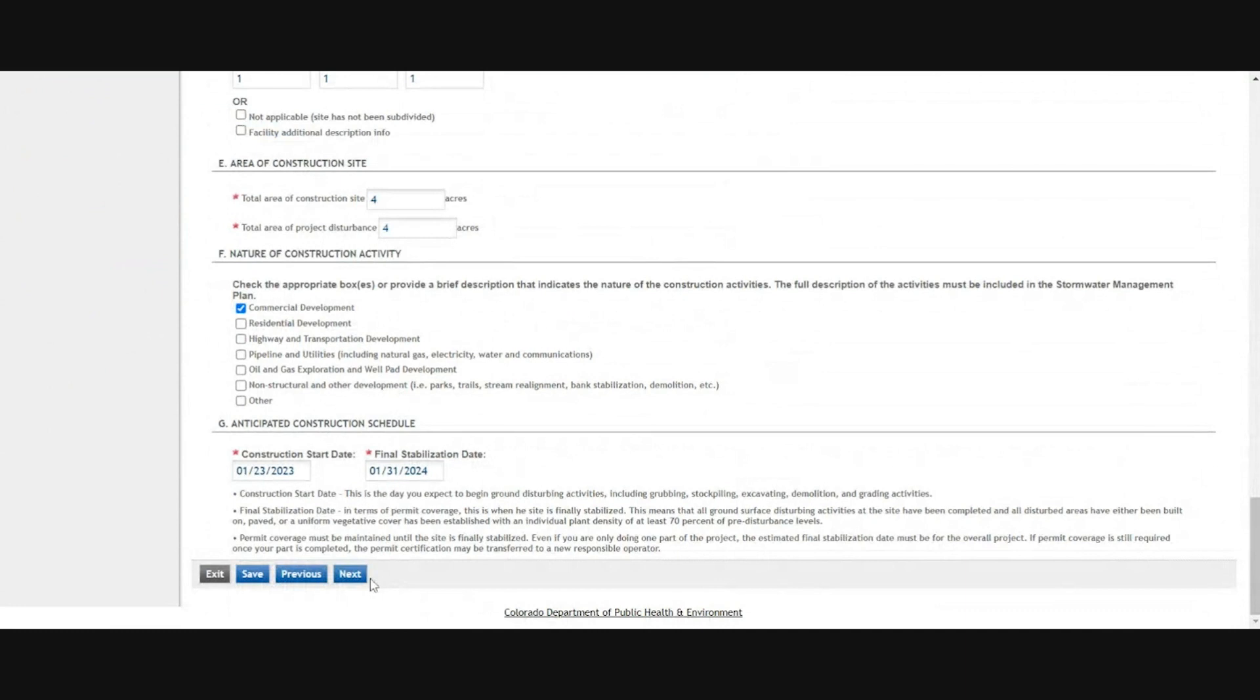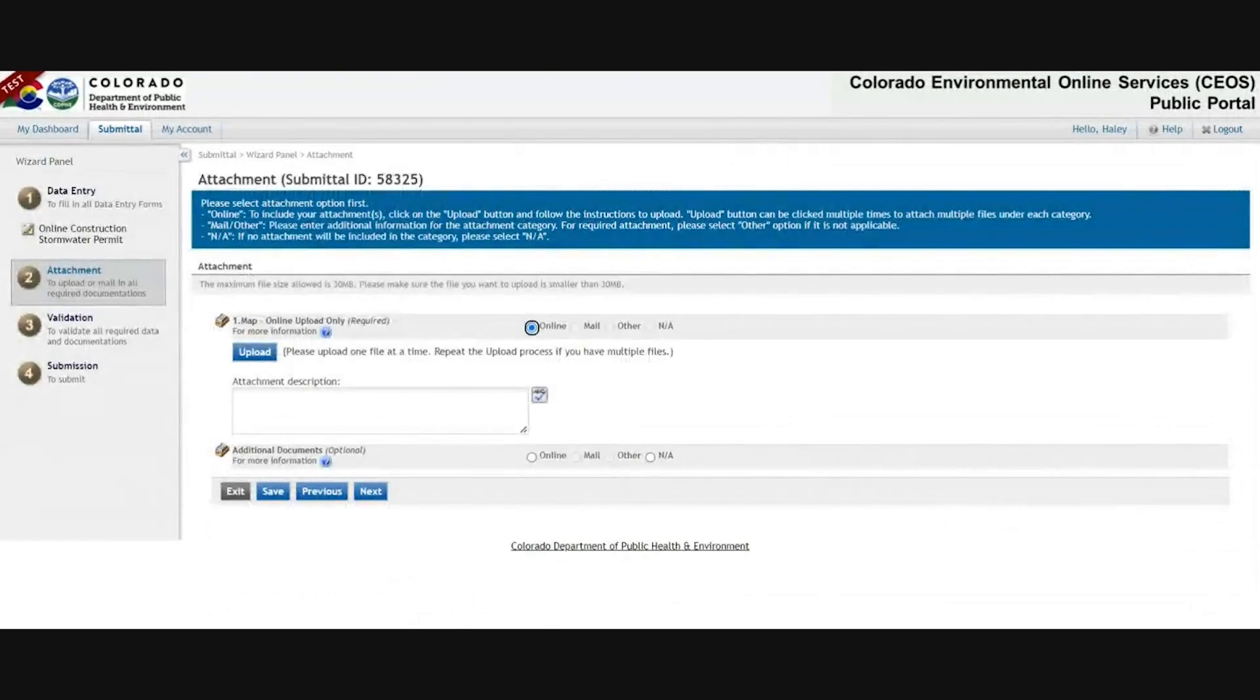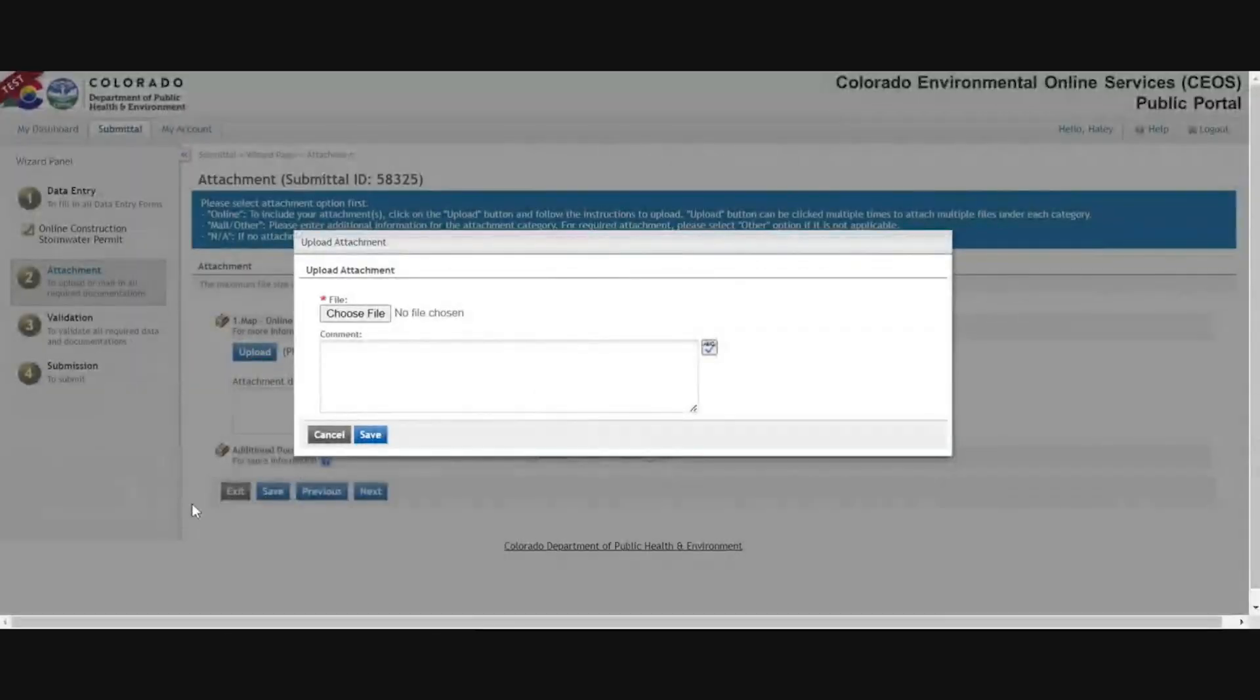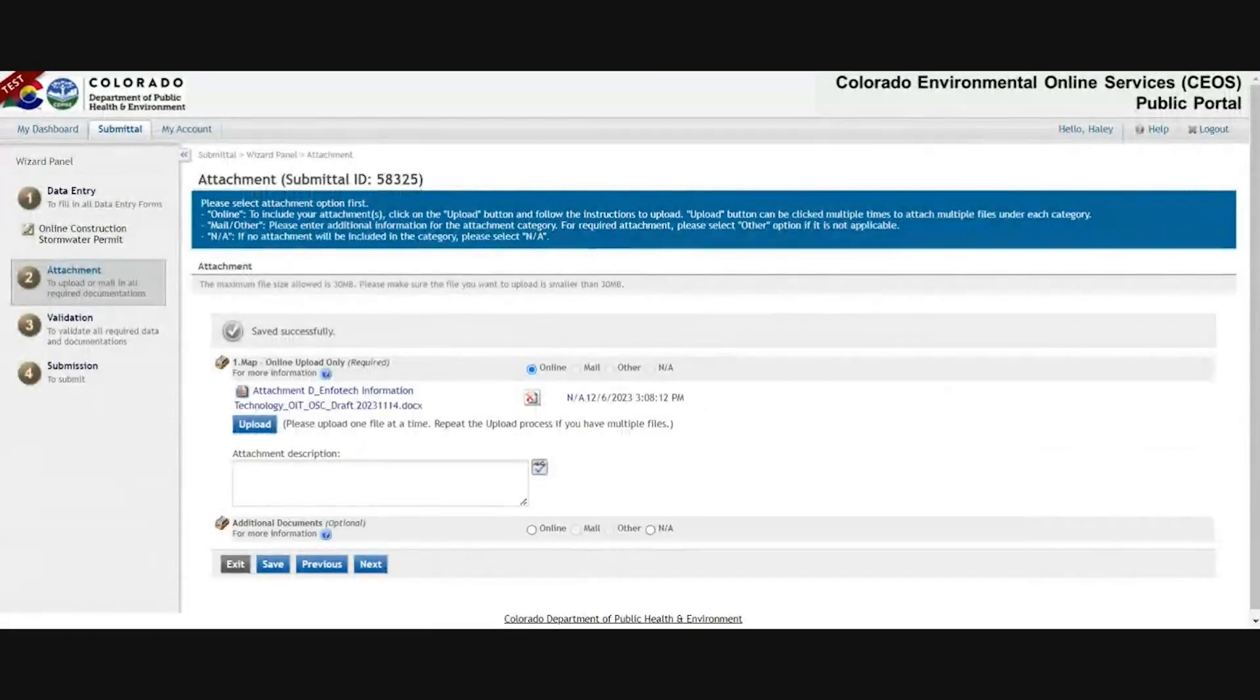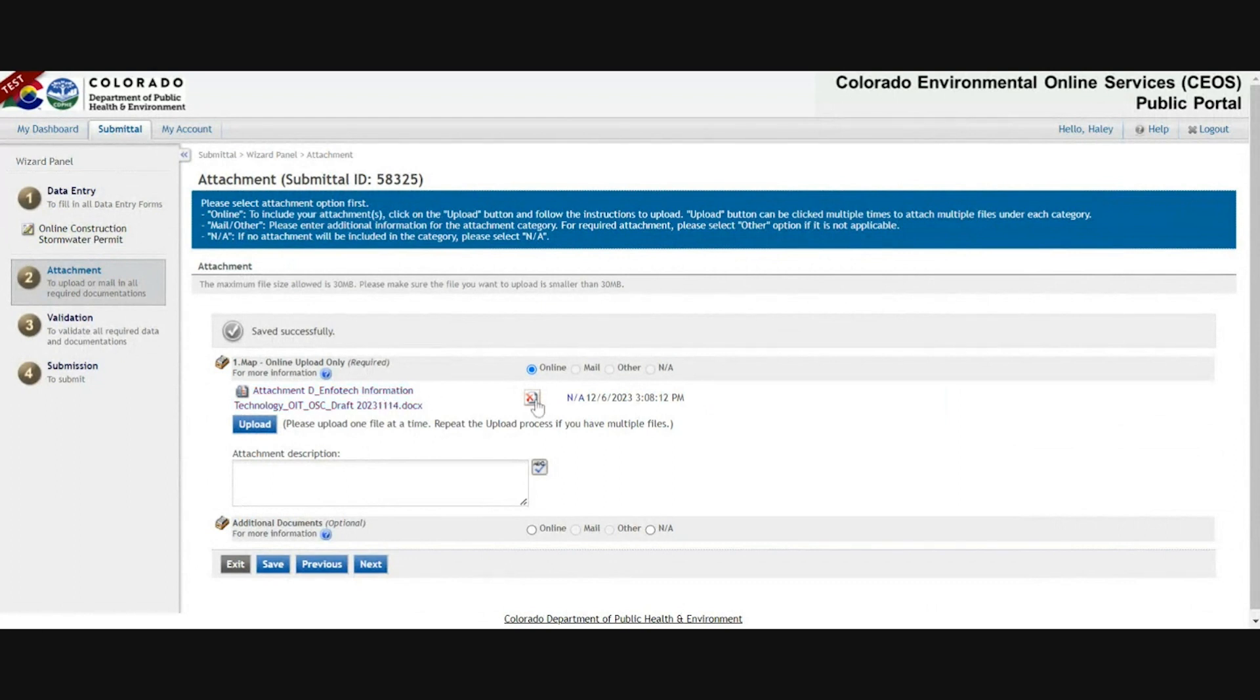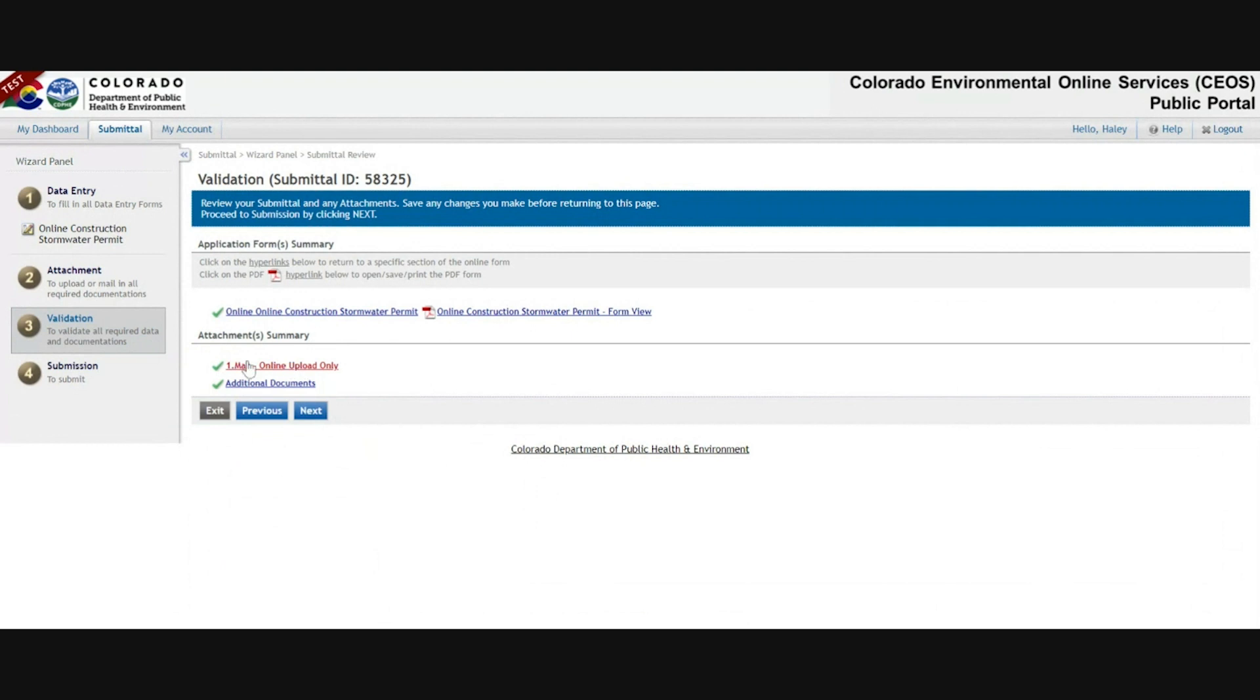Once everything's filled out, click next. Then there is a requirement for you to attach a map of your site. Click next. It'll give you a green check mark showing that you've completed all of the required fields as well as that required attachment.